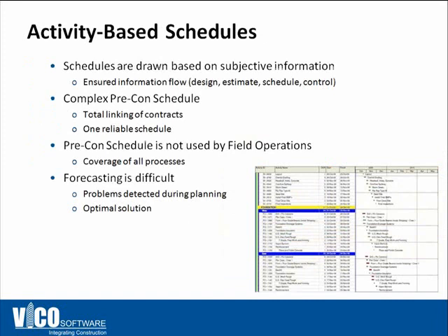So we were thinking about polling the audience about how often pre-construction schedules are used on site by the superintendent, but we know the answer, and based on the discussions with many of our clients, typically they don't necessarily use the same schedule during construction that they create during pre-construction. Typically, the schedule created during pre-construction is for selling the project, and eventually it just becomes wallpaper in the trailer.